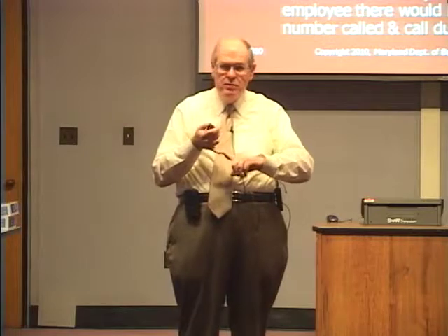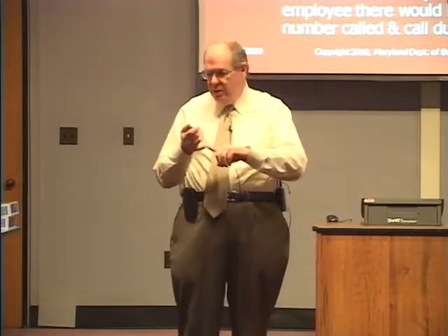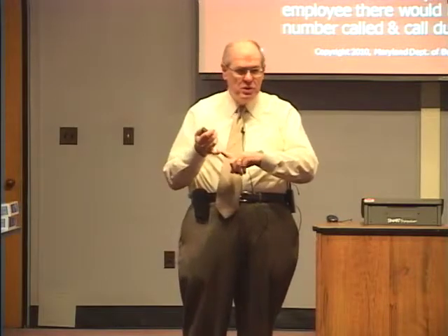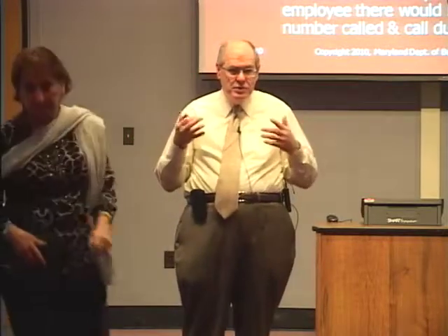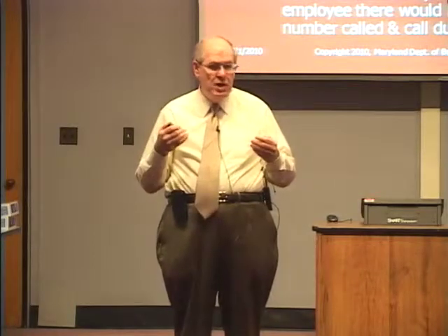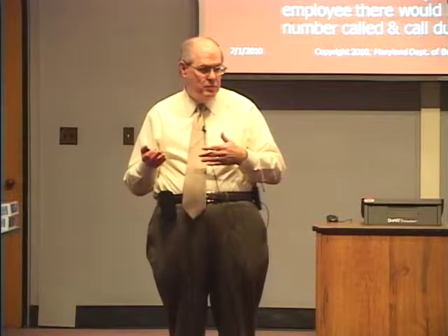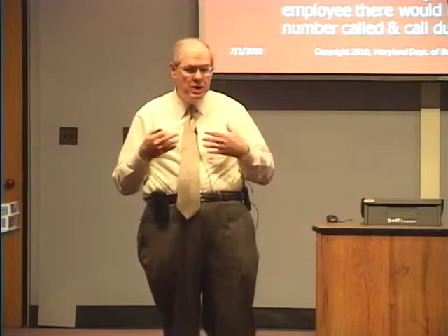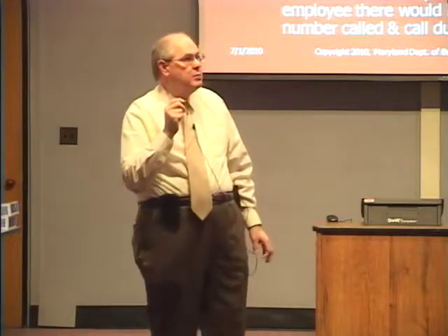We had a procedure whereby only certain people were authorized to call for maintenance. So then they kept track of it. Number one was a call placed for maintenance. So even if someone signed in and signed out, if no one called for maintenance because supposedly there was no problem, we wouldn't pay. If they came for routine maintenance, we wouldn't pay for routine maintenance. We only pay for other types. So that's what you go at. So if they're on site, sign in, sign out by a state employee.